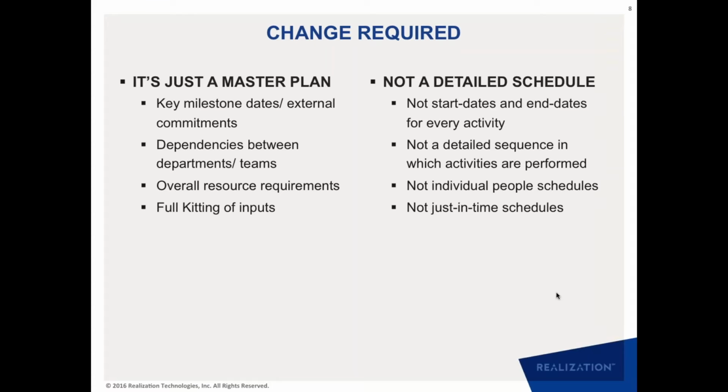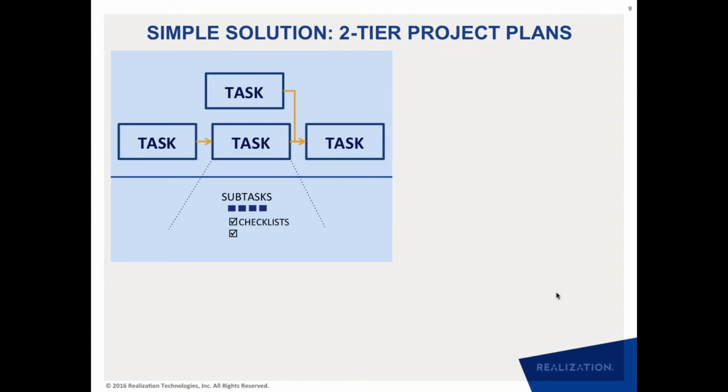And if we accept this change, the need for details does not go away. All we are saying is that from a planning perspective, the plan is just a master plan. Yes, you can capture all those details as long as the intention of those details is not to have a detailed schedule.